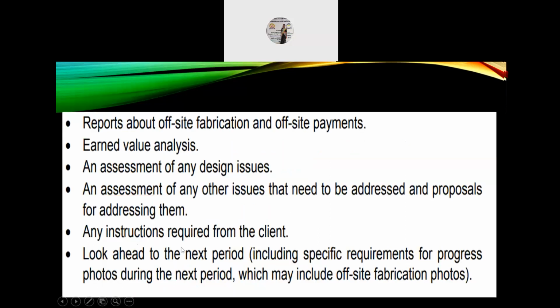In continuation with the previous points, reports about off-site fabrication and off-site payments, earned value analysis (EVA), an assessment of any design issues, an assessment of any other issues that need to be addressed and proposals for addressing them, any instructions required from the client, and looking ahead to the next period, including specific requirements for progress photos during the next period, which may include off-site fabrication photos.